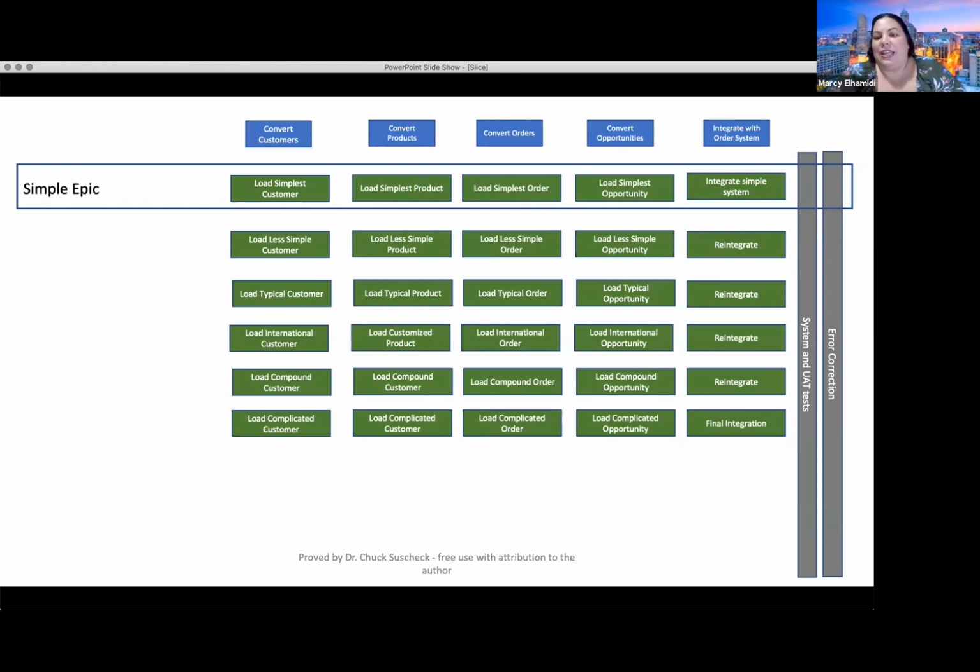And I was really trying to get them to batch by file size or something like that, right? Take the smallest file sizes you have and batch those over, see what kind of loading issues you run into, because the concern was around loading issues and loading time. Then, once you've batched the smaller ones, take the next bigger ones and batch those, see if you run into loading issues, and continue to do that until you figure out what the magic formula is for a smooth batch process, right?